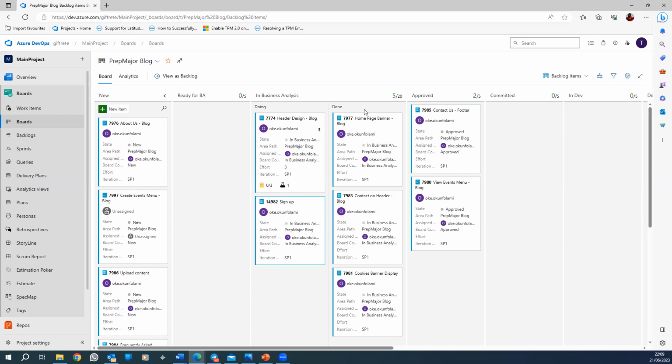Before sprint planning, you have to arrange another meeting with your product owner so that they can go over your stories and say, okay, that is what I meant, and you have correctly captured it. You will now move it to Approved. So this is how the stories travel on the board. When you're going for sprint planning, your stories should already be in Approved.